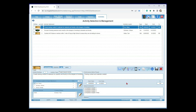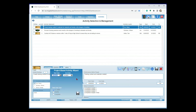Sometimes you'll have activities that are either done or not done — almost like a yes-no question. You can pop open the little wizard. You see data entry types: the 0 to 100 default, a yes-no option where yes equals 100% and no equals 0%, or a Complete option where at the end of a set period you just check the box to say you're complete. Just a couple of different options.